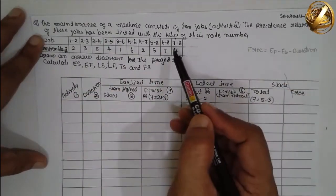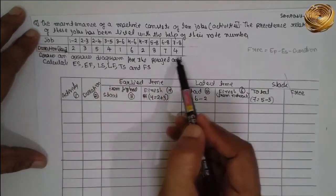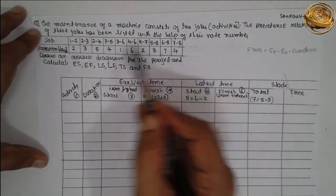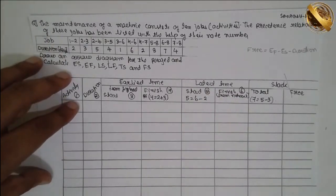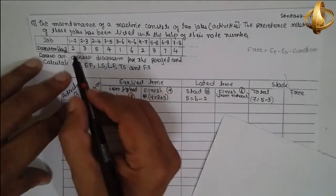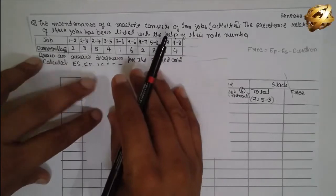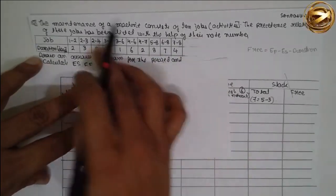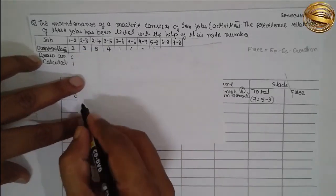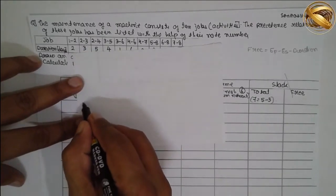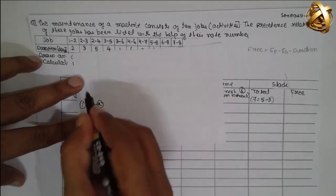This is the data given — job processing time and duration. First, based on this, we are going to construct the network diagram using the activity-on-arrow method. I will construct the diagram based upon the job and duration. First: node 1 to 2, duration is 2.